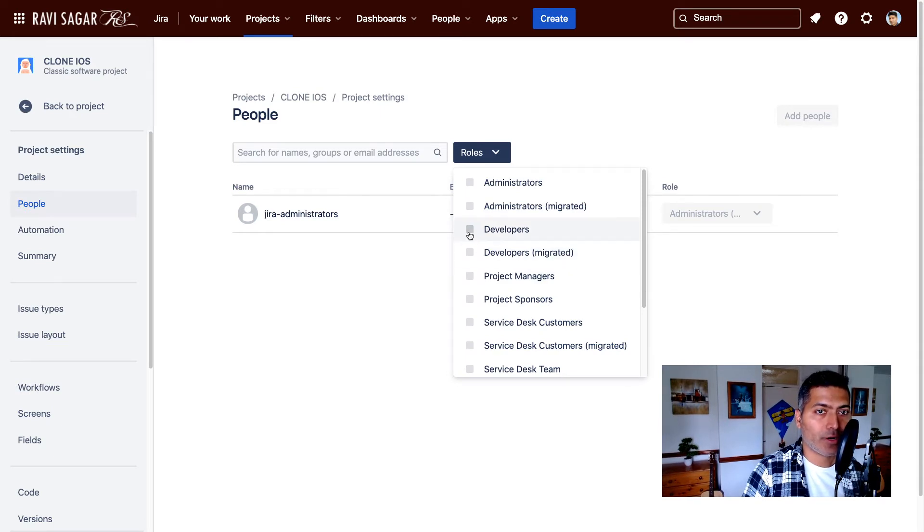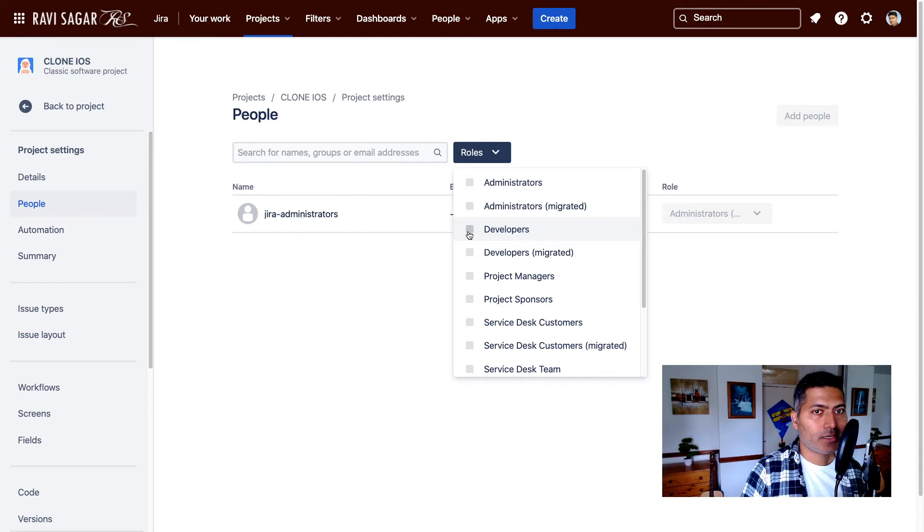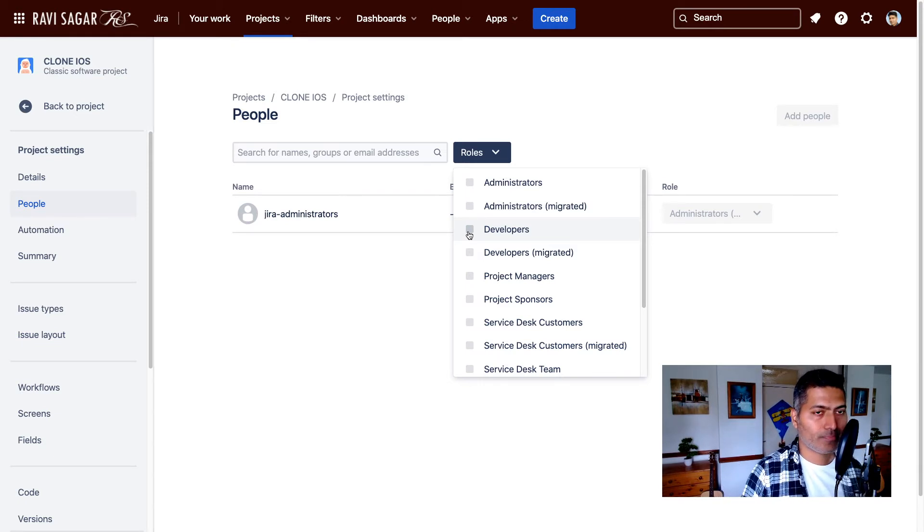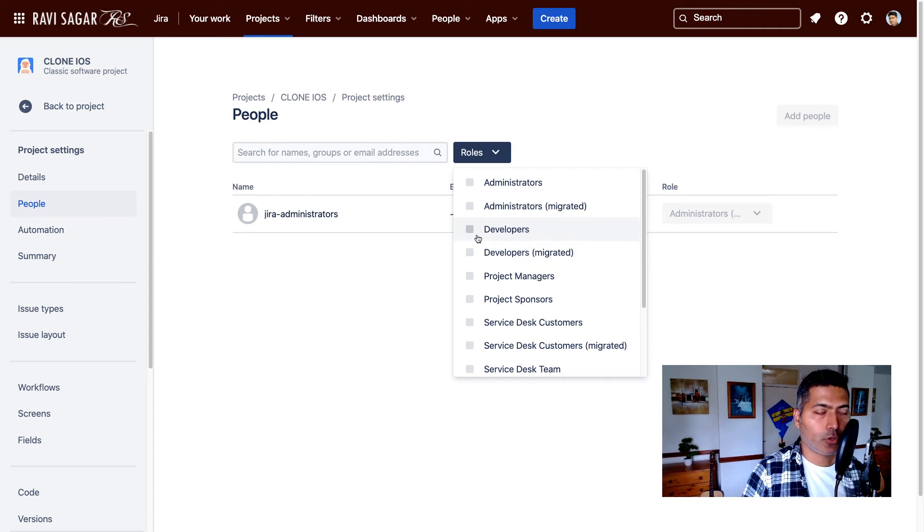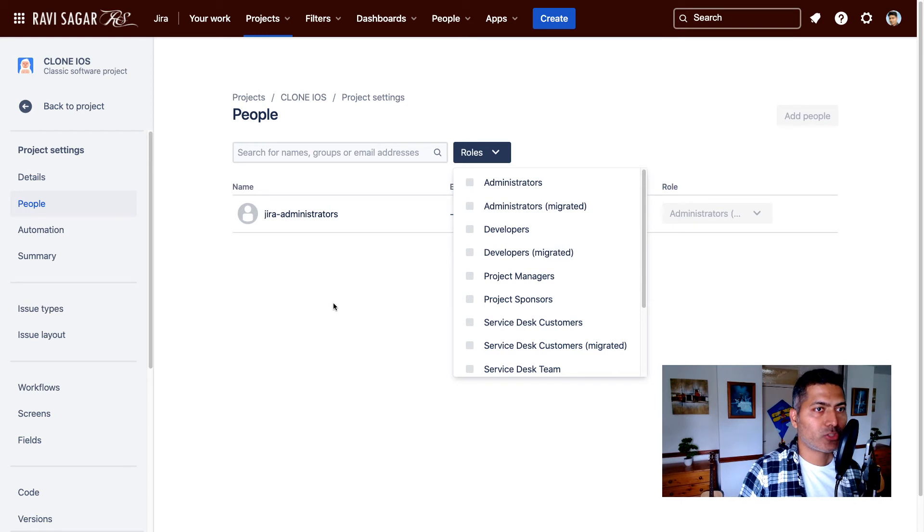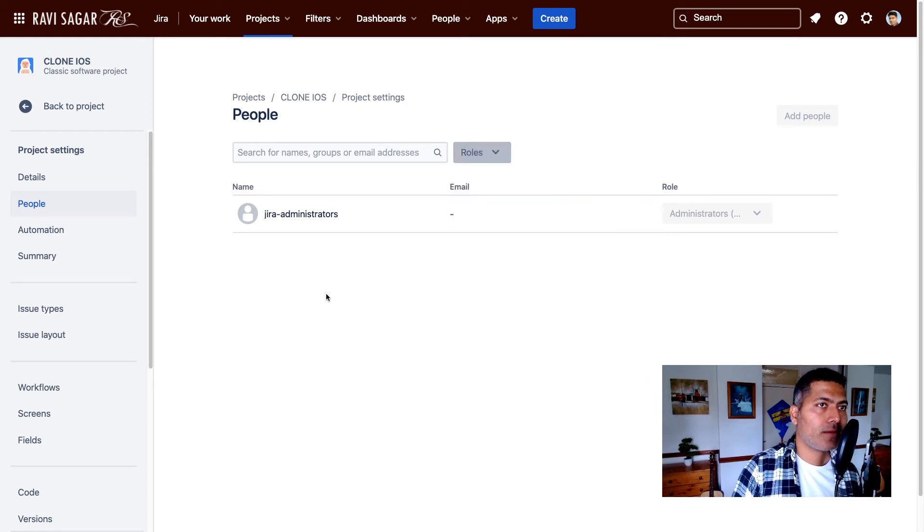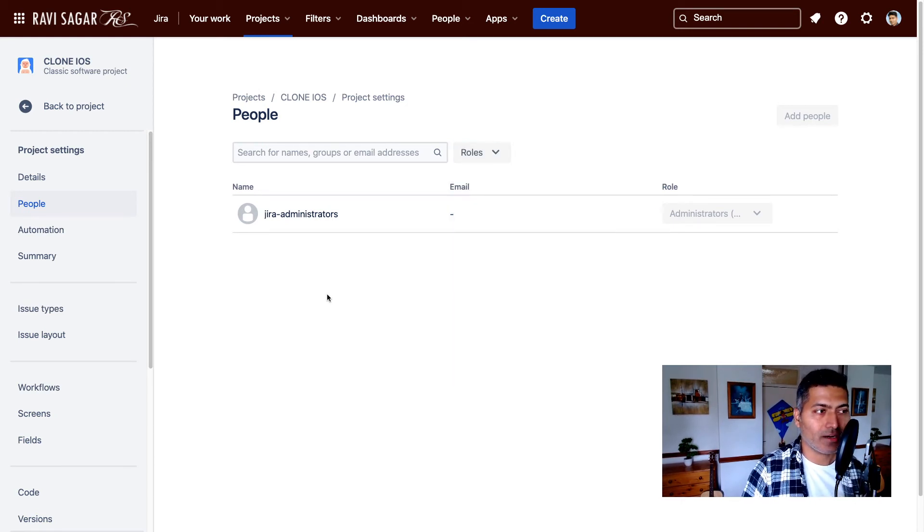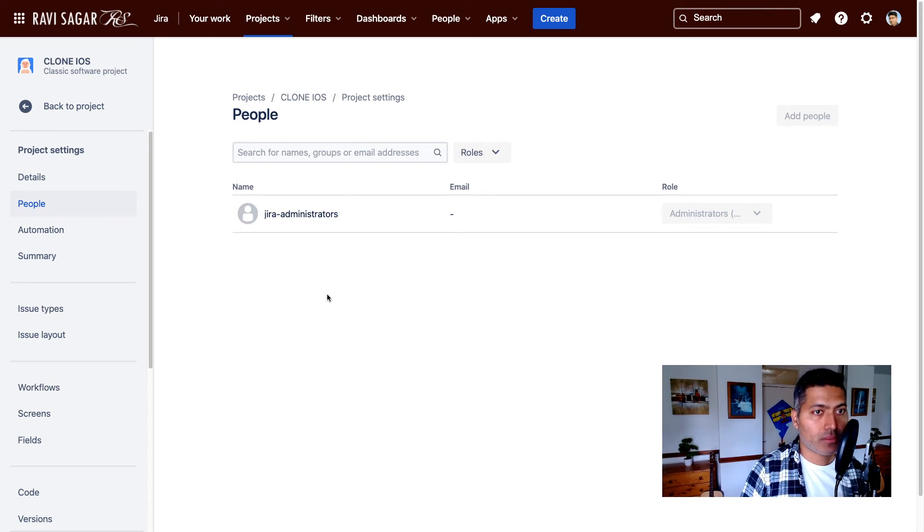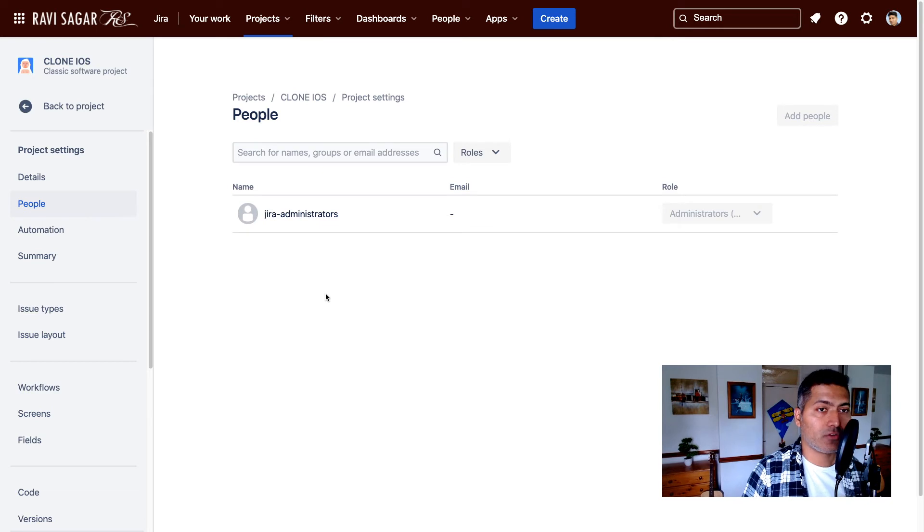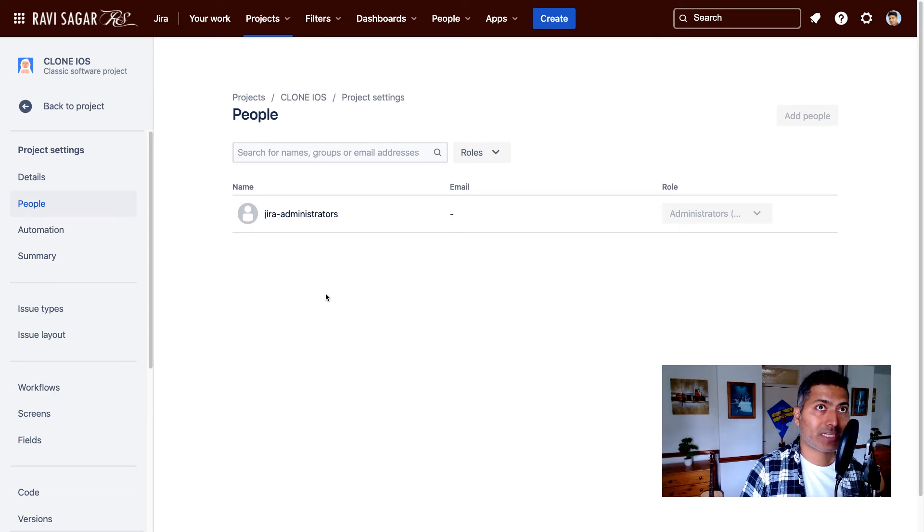So let us say if you want a vendor to access only his or her own project, you can create a role here called vendor. And in the permission scheme, give the browse project permission to the vendor. Now, when you create a project with this particular configuration, where browse project permission is given to vendor,